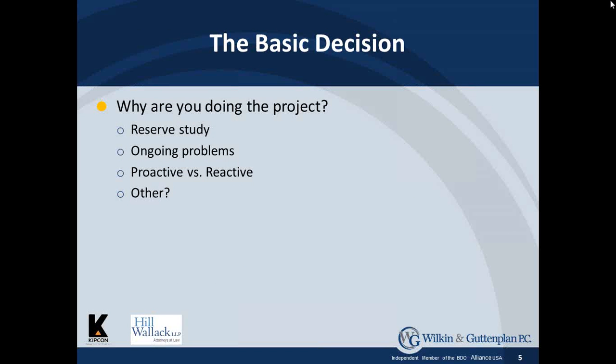There's an association where I got a phone call just a few weeks ago that the reserve study said that they should be replacing the driveways throughout their community, so they wanted a proposal to do specifications for the replacement of the driveways. After talking to the manager and explaining to her that the reserve study is a budgetary tool, and it means that not all the driveways have to be replaced at once, but some may be replaced in 2 or 3 years, and only a few of them may need to be replaced in the first year. What we did is we came up with a plan of attack to replace the driveways over a 2 or 3 year period.